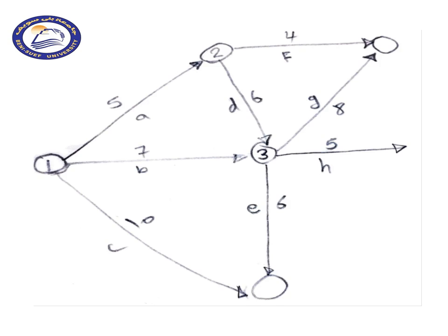The next step is drawing activities G and H. Like you can see, there is an activity that is waiting for activities F and G to finish, which will be activity J. So we have to combine activities F and G together in one node like that. And activity H is free to move around, like you can see, until we see the next node.